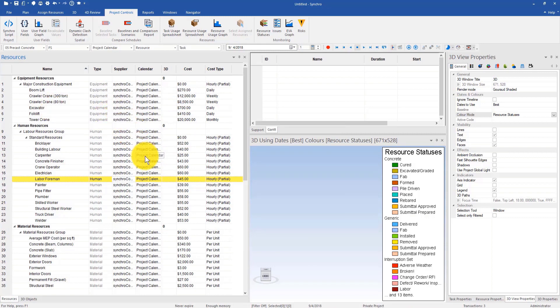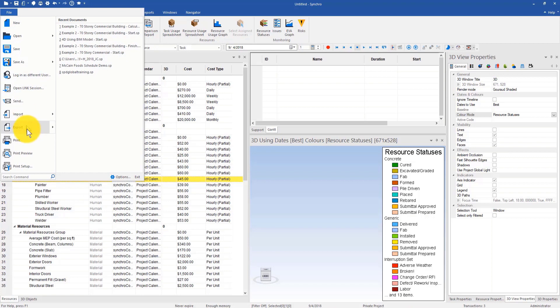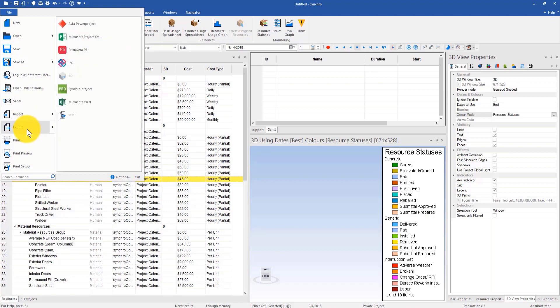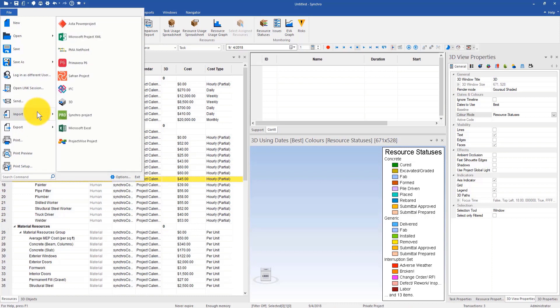You can see here are the costs imported along with the resources. That is to say, if you have historic cost data that you want to import from a past project which is a Synchro project, you can do that. Don't forget that you can always populate those in Excel. All you need to do is export into an Excel spreadsheet, update them properly, and then import them by the updated Excel spreadsheet.